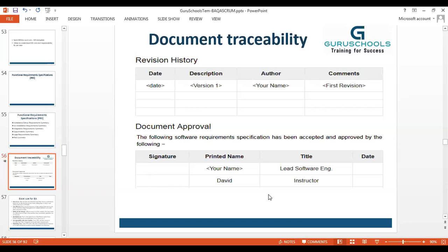Then there is the document approval process. Document approval will be done within the organization for you. The approval of a client is normally taken by the project manager. So the requirement approval pipe goes through the project manager, or the person in charge of overall project ownership and credibility. As far as the SRS goes, approval is your responsibility via the PM. That's how we balance the team, and that's how the overall approval process works. That's how the overall traceability also works.